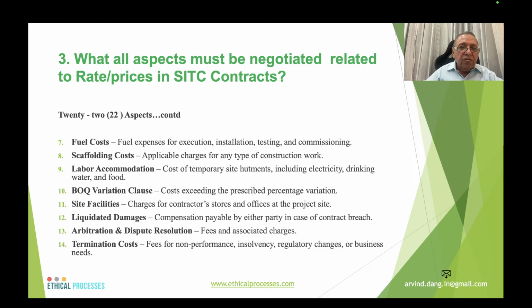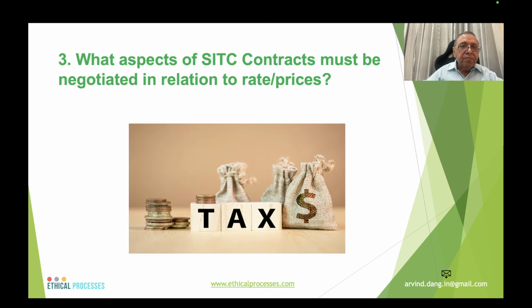Site facilities, charges for contractors, stores, and office at the project site. Who will bear this? Liquidated damages, compensation payable by either party in case of contract breach. Arbitration and dispute resolution, fees and associated charges. And termination clause, cost, fees for non-performance, insolvency, regulatory changes, or business needs.